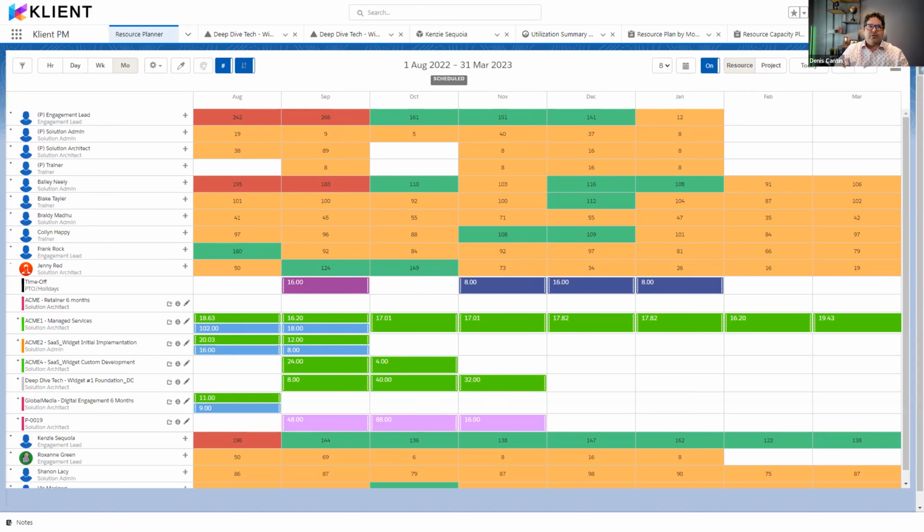Someone was asking me what she was doing wrong by assigning planned hours and they were not transferred over to schedule. I answered already by text, but the answer is basically that when you have the syncing option activated, that sync goes from schedule to plan. So planned hours are really hours assigned at the project level, and scheduled hours at the task level. So when you change from the plan view to the scheduled view, if you have the syncing option, if you work on the schedule, it's going to update your plan hours, but not the other way around.